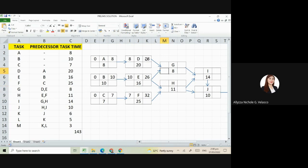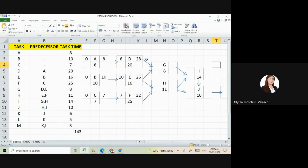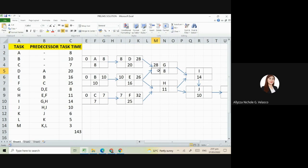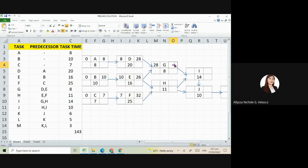Next is our G. As you can see, it's connected to D and E. Those are its predecessors. So what will we choose? Again, the higher one, because we need to wait for task D to be finished before we can do task G. Next is 28 plus 8 is 36.